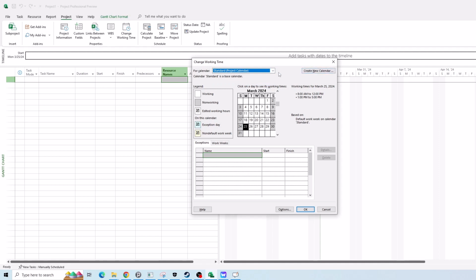If the information for the new calendar that you're going to use is exactly the same as one of these three, don't use these three. The reason is, if you want to connect to the project server, these three already exist on the project server, and there will be a conflict between these calendars and those calendars that already exist on the project server side.